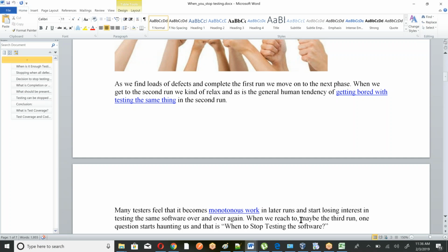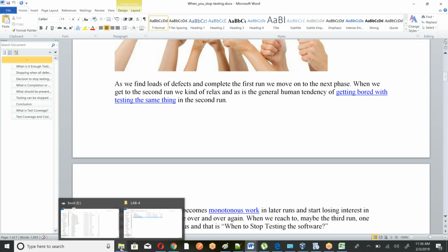That's why they say make it a smaller group. The standard is 7 to 10 people, and 2 to 3 weeks time frame, not more. A sprint is 2 weeks to 1 month, and the standard rule is 5 to 7 stories.